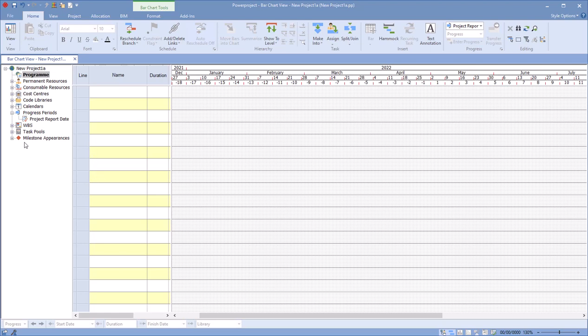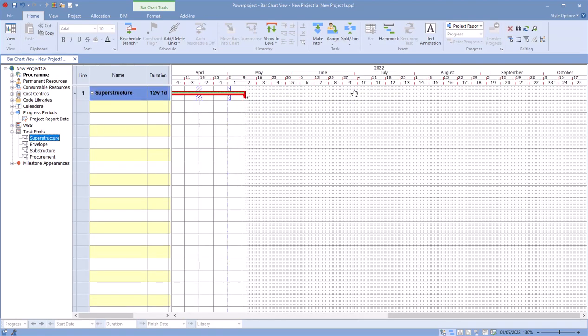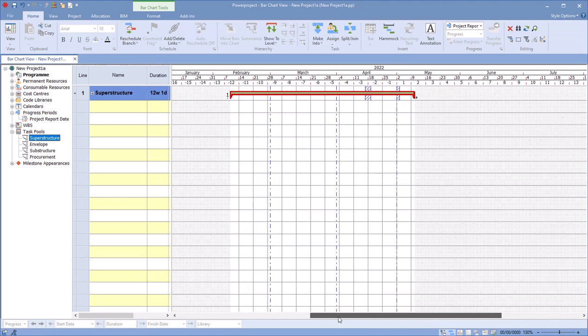As an example here, we have task pools inside this template. This is the standard construction and we have superstructure, envelope, substructure, procurement. If I wanted to use any of these, I can just click on those, drag them onto this screen, and that will then drop those on there.